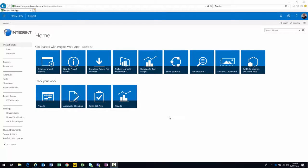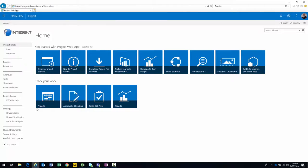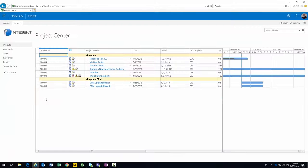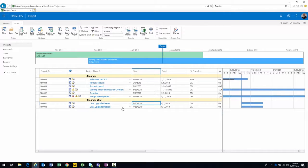Looking at my trainer demonstration environment, I'm going to go to Project Center. Notice at the bottom we have two projects: CRM Upgrade Phase One and CRM Upgrade Phase Two — both starting on the same date and both ending on the same date. In the Gantt chart, they both start and end on the same dates. What we want to do is create a relationship such that activities in Phase One impact Phase Two, so Phase Two doesn't start until Phase One completes.